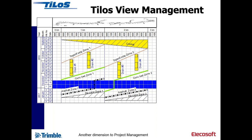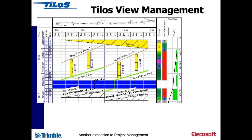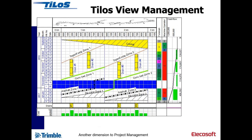You can create a second cell on top of the first — a distance cell — where you create your own distance ruler with as many rows as you want. You can have another distance cell containing a map of the route. You can have a time cell with a highly flexible time ruler with no restriction on number of rows or columns. If you've got resources or cost, you can see individual quantities. TILOS doesn't do resource leveling but does very good resource planning. You can have a period graph showing money, man hours, or cubic meters of spoil per week, month, or hour — both periodically and cumulatively.